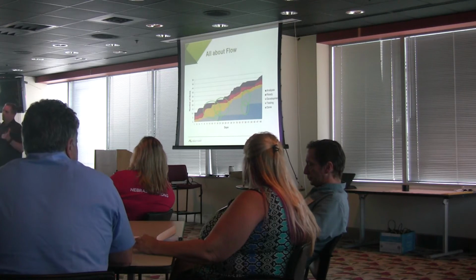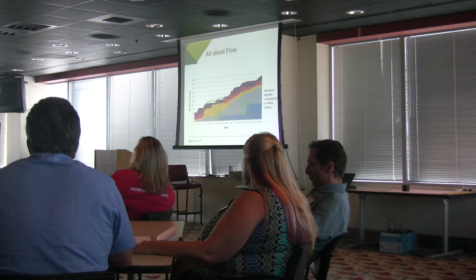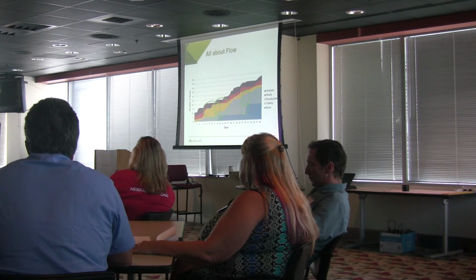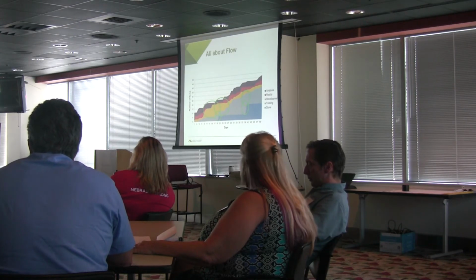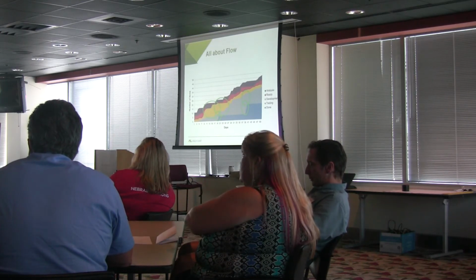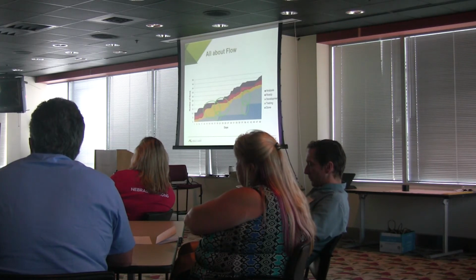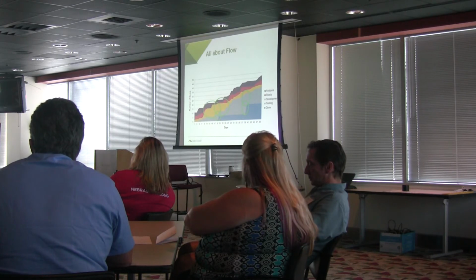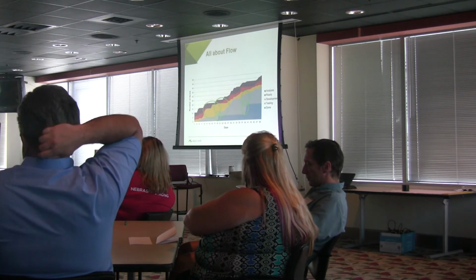So what's important, this is a useful piece of information. If you're doing Scrum, this is valuable for a Scrum team. If you're doing Kanban, this is valuable. If you're doing Waterfall, this is valuable for Waterfall. This is valuable information to understand what's happening within your work system, right? What's going on, where you're being overburdened perhaps, where your WIP limits are off, maybe. And maybe their WIP limits are fine the way they stated them, but they're not being honored, right? So we said we got a WIP limit of 4, but I've got 10 things in queue. Any team have that going on?